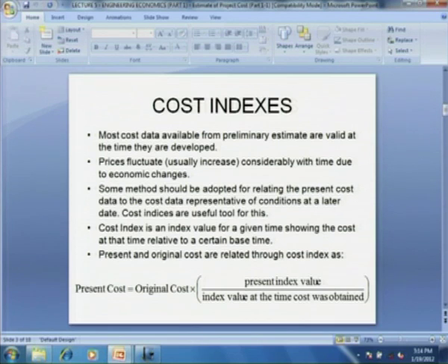Pre-design cost estimates, what we also define as order of magnitude estimates or preliminary estimates, require much less detail than the firm estimates such as definitive or detailed estimate. However, pre-design estimates are extremely important for determining whether a proposed project should be given further consideration or for comparing process alternatives or alternate designs. And therefore, for this reason, what we shall see in this module is for the pre-design estimate.